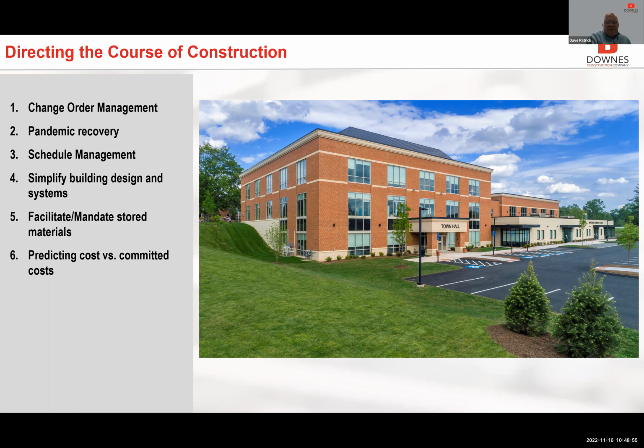So the closeout process, I think, is also one of the more important pieces. And we talk about it here internally all the time, that closeout starts right at the beginning of the job. Start assembling your closeout documentation with each subcontractor that comes on the project, so it simplifies that process at the end.